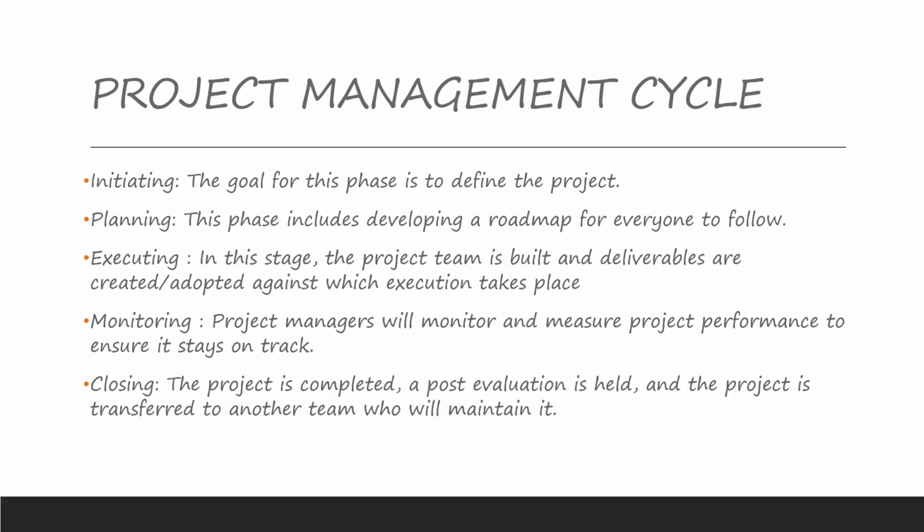The only time you transfer a project is, let's say, for example, your project is to implement taps for running water in a certain community or a county. Then at the end of your project is implementation, and then you pull out at the end of your project cycle and you hand it over to the community that will now utilize it. That is what we mean when we say the project is transferred to another team who will maintain it.